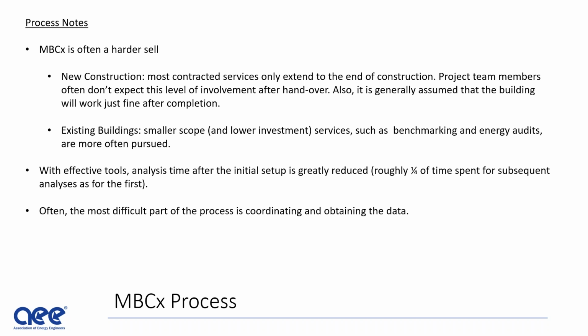And like I said before, often what you find through monitoring-based commissioning is the low and no cost measures, tweaks to schedules and set points or other controls items. It does also reveal if there are fundamental issues with equipment, or that fixes need to be made in the field.